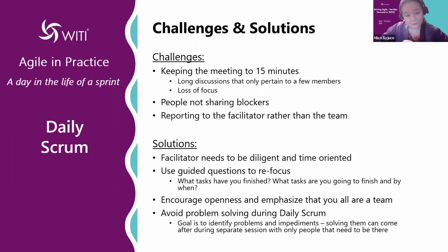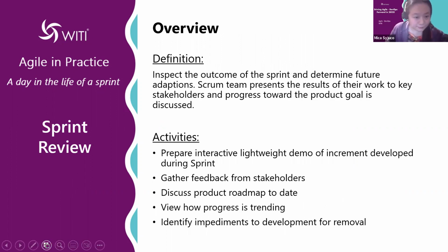Yeah, and then the product owner or business owner can say to the stakeholder or customer, if you want this feature, it's going to cost you this much, it's going to take you this long. The team is doing 20 points per sprint. If you want this feature, which is 25 points total rolled up, it's going to take us over 1 sprint. So we have to be able to provide some type of predictability. Without estimation, we can't really predict. And that's a lot of the challenges the product owner has. They don't know what to tell the customer. When could we have this?